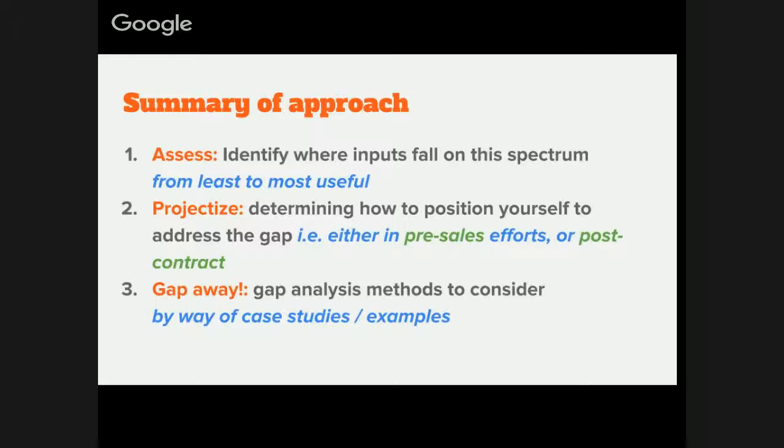Like your gap, we'd love to do business with you, but the gap in the knowledge base between your A and your B is so broad, the risks are so high, that the only way it really makes sense is to projectize the discovery, where the end goal is closing that gap. And that's a hard business decision to make, because it kind of looks like saying no. But the trick and the art of it is to say, that information needs to happen anyway. So it's not saying no, it's saying kind of not yet.